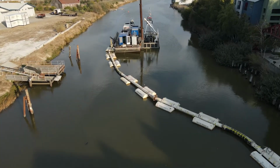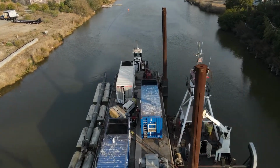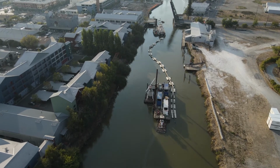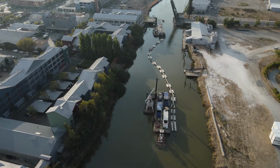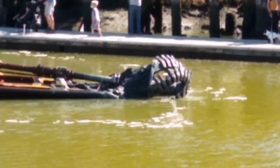Was there anything special? Because I heard there were batteries and electricity used, and because it wasn't that loud, it wasn't like large diesel engines that we heard. It was a fairly quiet operation, wasn't it? So they had a second barge that was hooked up to their primary barge. The reasoning for that wasn't necessarily the type of fuel. It was because otherwise they would have to get a barge that was too big for the river width. And so they had a generator and system on the other barge to power their sandpiper. There were a lot of issues with garbage that they encountered during the dredging.